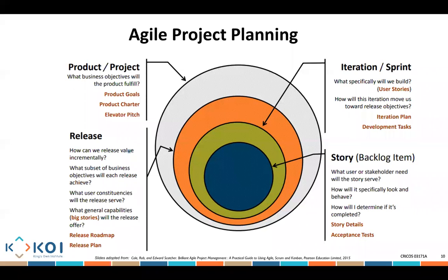Now, the best way to write the acceptance criteria is like this: if the user was to do this, this will happen. If the user logs into the page and creates account details, he should be able to get the reports and do whatever he would like on the actual software. If something happens, that's the acceptance criteria you try to incorporate.